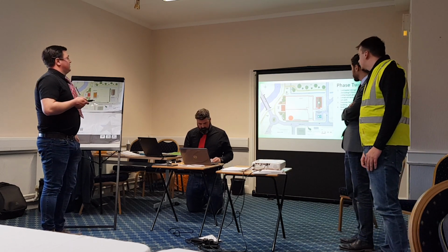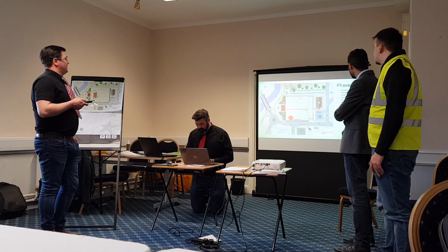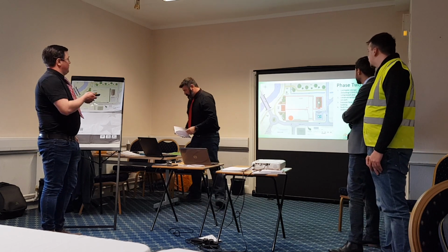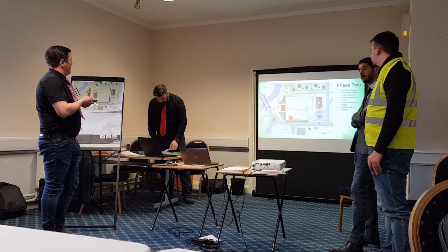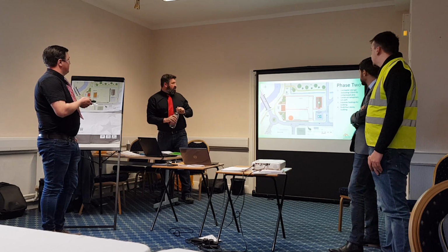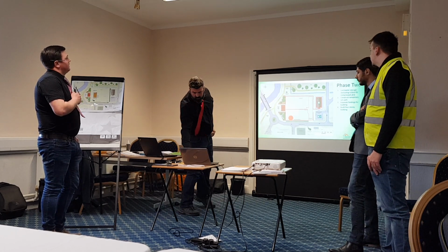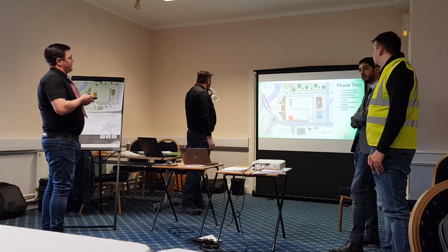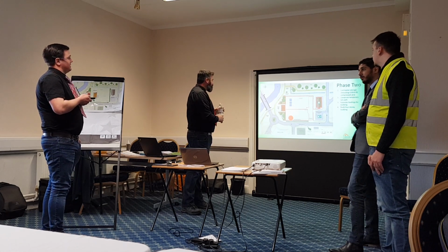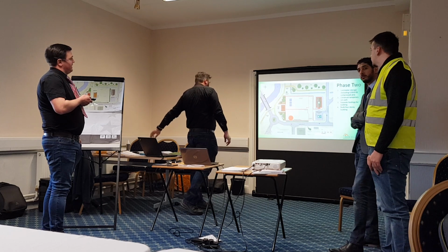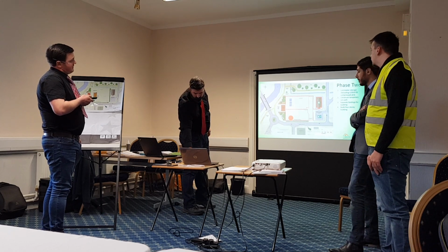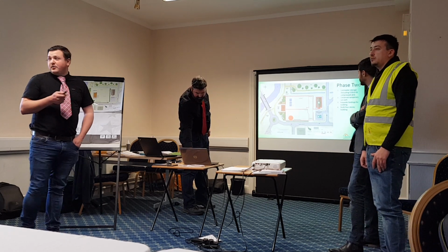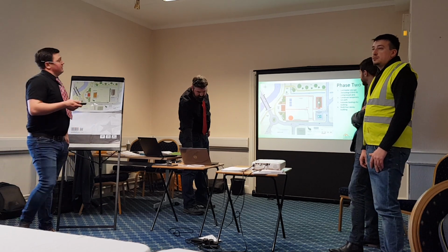Phase 2 will be installing contractor storage, including the COSHH and compressed air, which will be going here on the next slide. Obviously these will be labelled up and signed, so we've got a compressed air cage here for compressed gases, and we've got our COSHH cage here. These will be the storage containers here for all our contractors, plumbing, electricians, shop fitters.